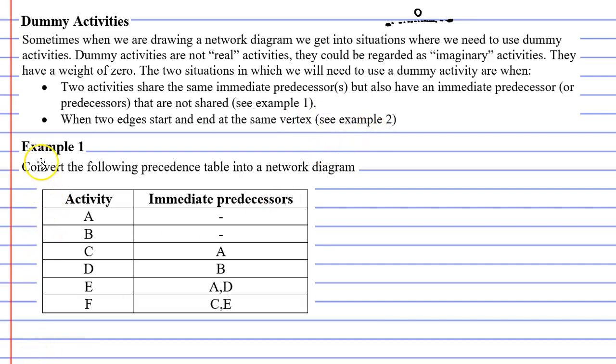So we'll start with example one. It says convert the following precedence table into a network diagram. We can see we've got two activities, activities A and B, which don't have any immediate predecessors. So we'll put down our start vertex, label it as our start, and we'll have both activities A and B coming out from this vertex. So that's A and B completed.